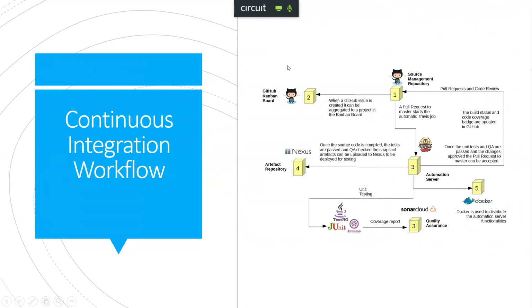And for this agile process of checking what we are doing, the features and the meetings, and most importantly, to have effective meetings, what we are using is something we like a lot, which is the Kanban board. The Kanban board is a way in which you put the issues and you move the issues in ongoing, to do, prioritize things, and so on. And then once you select an issue in the board as ongoing,